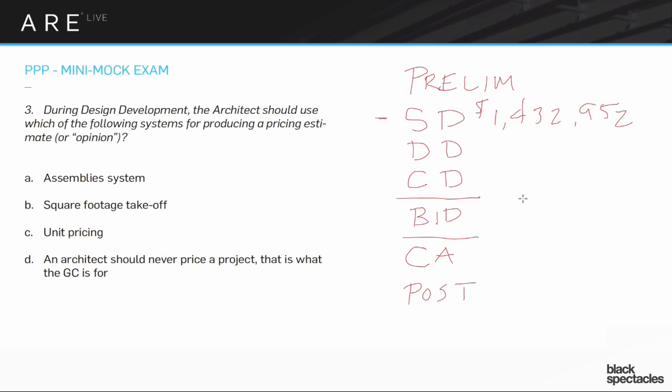That's ridiculous. You can't tell them that. It just doesn't make any sense, because that's way too specific of a number, and that specificity is actually problematic. You're implying that you know more than you do. If that number ended up being 1.8 or 1.7 or 2.0 million, you could have all kinds of problems coming back at you about not being forthright with them when you gave this very exact number.